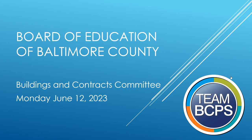Do you expect a decrease in those expenditures once ERP is fully implemented? Are these one time? Yes, this will be surge. The industry standard right now is that a typical ERP system implementation runs anywhere between 24 to 36 months. It is typically done in a staged fashion where you take back office functions such as payroll and finance at a certain time, and HR would be done along a staggered approach. There will be a period of time where we have the supplemental staff. While we're doing that, we'll also be training our existing staff in whatever system will be used, doing a skill set analysis to see if we need to bring in additional FTEs, and balancing that with ongoing contract IT support.